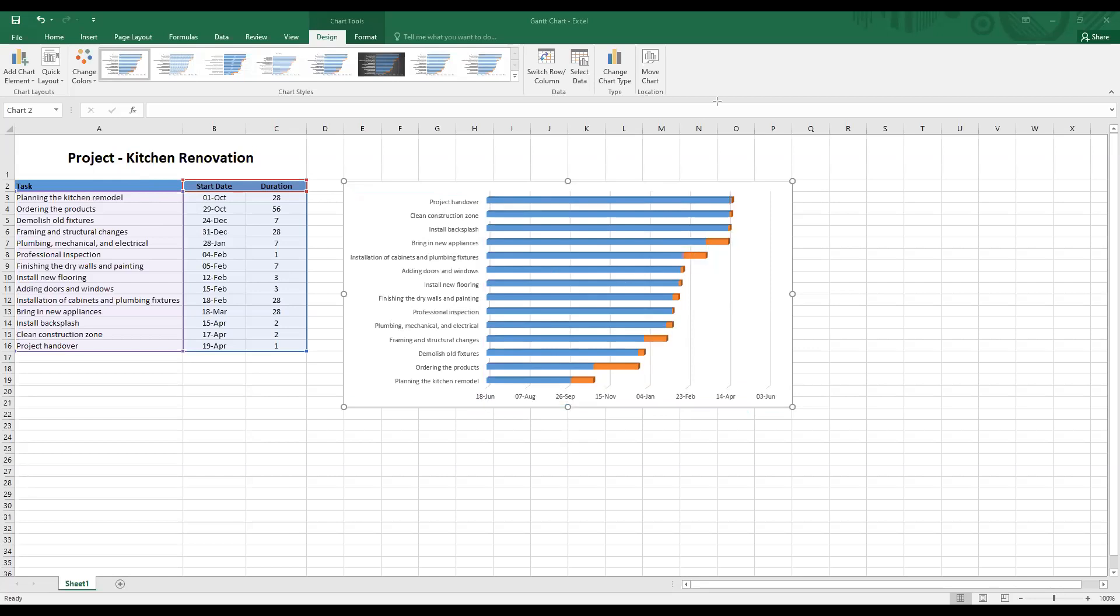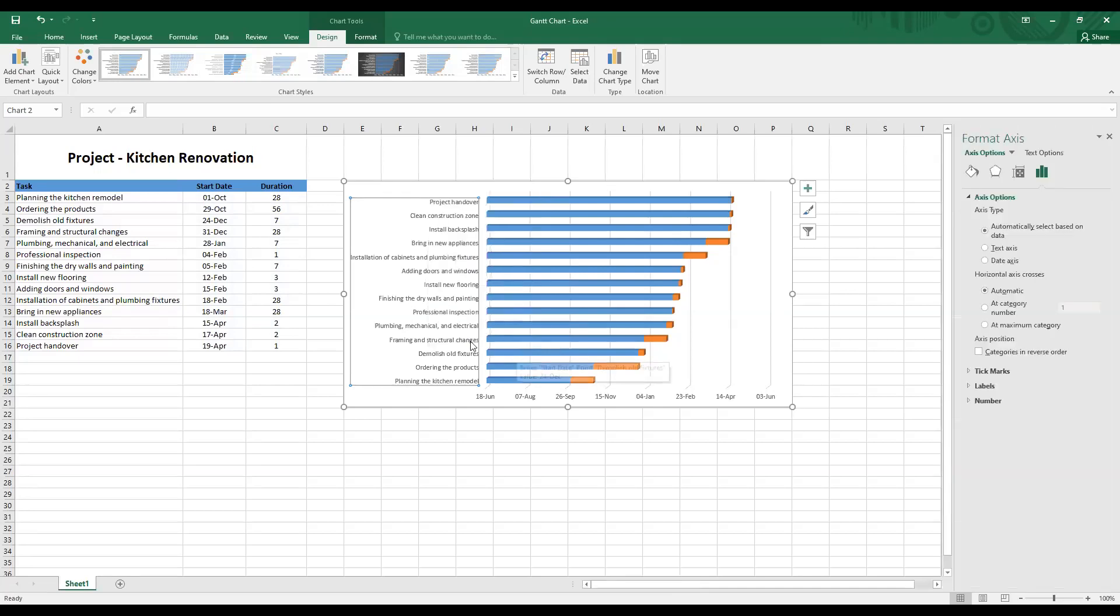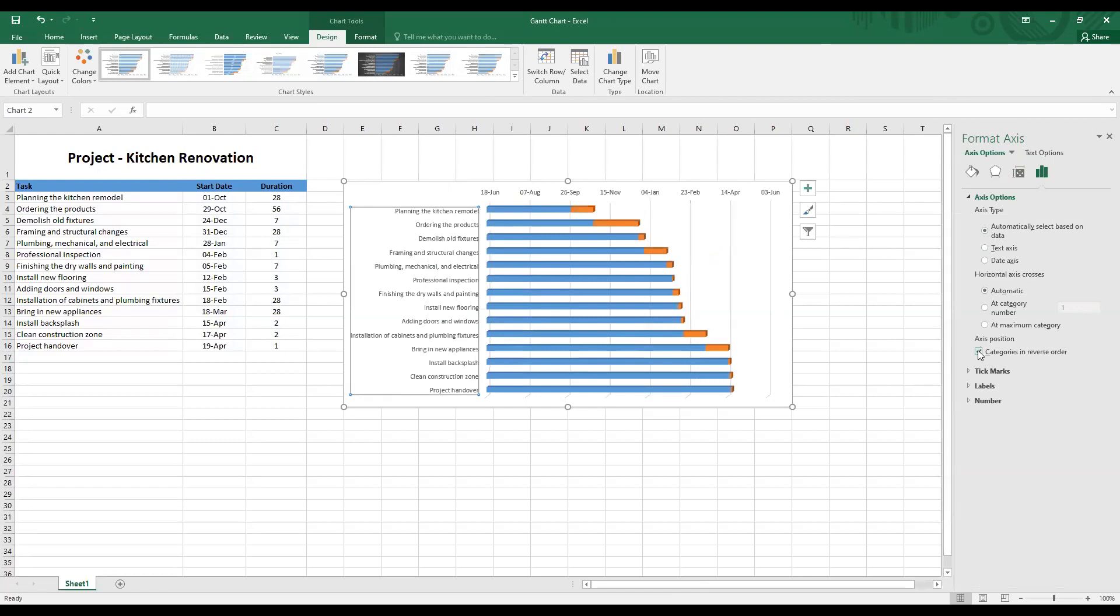To solve the first problem, that is the title of the tasks, I need to right click on the tasks and click on format axis. Once you do that, the format axis dialog box appears in front of you. And under axis position over here, check the box that reads categories in reverse order. And immediately you can see there is a change in the ordering of the tasks.